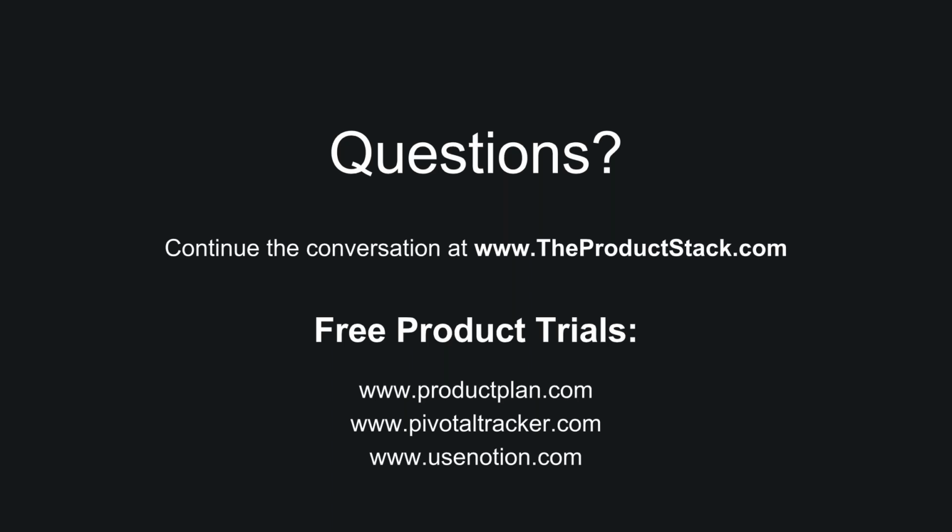Then, as far as estimation, I think there's multiple levels of estimation. There's typically sort of a high level guess as to how big a feature is. T-shirt sizes are commonly used for this. We tend to look at things in terms of pair weeks, because at Pivotal, everybody pair programs, so we always count developers in pairs. So we say this is roughly a 12 pair week initiative. It's just a guess, you know, the reality will probably be longer or larger. It always is, but at least it gives you some relative sense to compare. And that's all you can do at the level of roadmap planning.